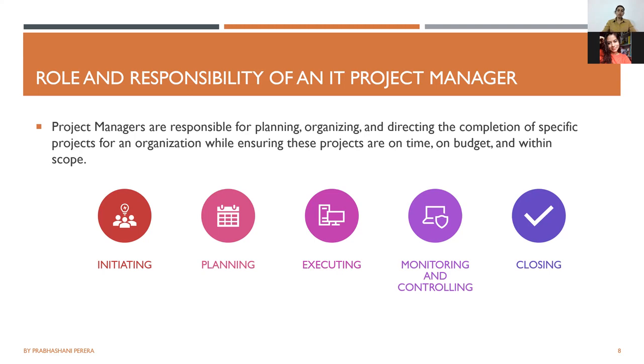Apart from those, a few other things that happen in the initiation stage are things like you try to identify why this project is important, and what specific problem we are trying to solve. Is there a desired outcome? Are there things that we cannot change? There could be a project that has to go by this date, because if not, there's no point in doing the project. So what are those key constraints? And then who are your key stakeholders? What kind of communication needs to happen? Are we making any assumptions for the project?